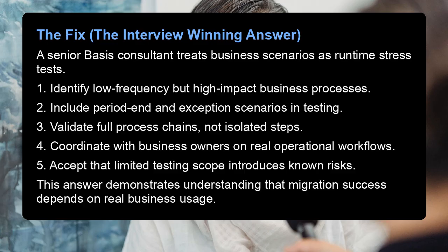The fix, the interview-winning answer. A senior Basis consultant treats business scenarios as runtime stress tests. 1. Identify low-frequency but high-impact business processes. 2. Include period-end and exception scenarios in testing. 3. Validate full process chains, not isolated steps. 4. Coordinate with business owners on real operational workflows. 5. Accept that limited testing scope introduces known risks. This answer demonstrates understanding that migration success depends on real business usage.